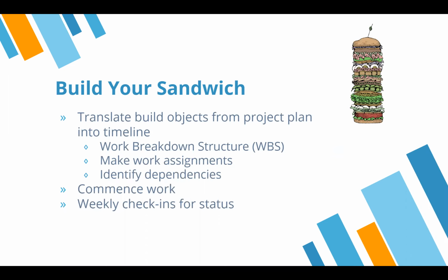And as I noted, weekly check-ins for status is a good place to start. Oftentimes you can parse that down to smaller audiences. If you have a large project team, you can meet with the business side, you can meet with the tech side, you can meet with the development staff, whatever is going to be easiest and, again, less confusing for everyone. And also the distribution of the weekly status of the tasks that are upcoming or going to be delivered for this week is a great way for everybody to be on the same page and not have to wade through a longer task list to understand what's happening.